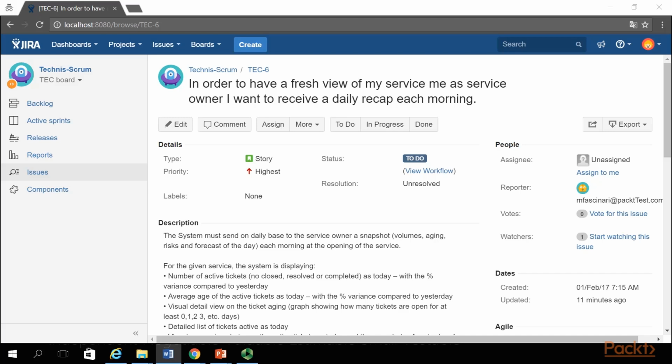As a final note, in this example for managing test cases, we decided to use subtasks as test cases. We could also use custom issue types, or search for some of the available Jira extensions or integrations that manage test cases. We took this decision mainly for simplicity and to reinforce that the test execution within the sprint is mandatory. Every single story must be done within the sprint.